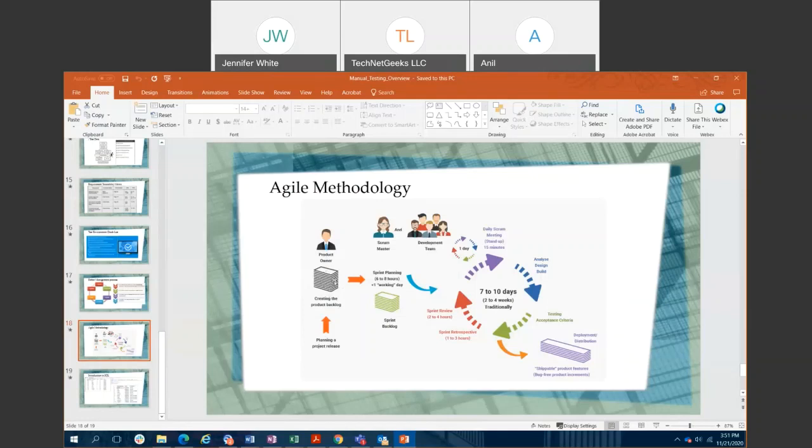So from the backlog, you work with the customer, you define what system you're going to build. And you bring that into a sprint backlog. Okay? So from the backlog, you work with the customers to identify which ones are the important stuff, which is urgent, and you bring that into a development cycle. And the whole development cycle really is anywhere from 2 to 4 weeks for you to develop a product, test a product, and release a product. We'll talk about what that cycle is and how you go about doing that.